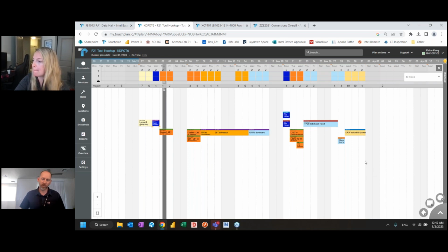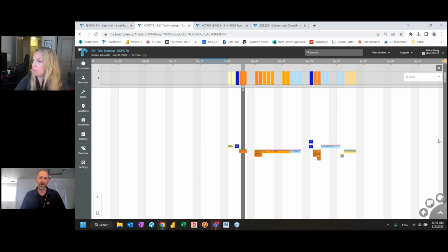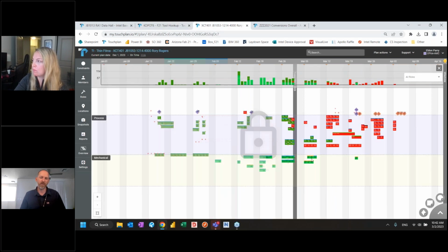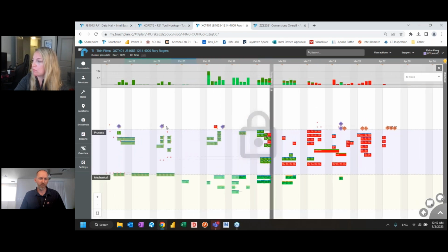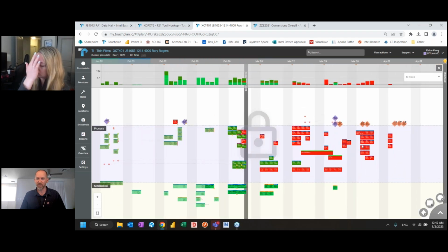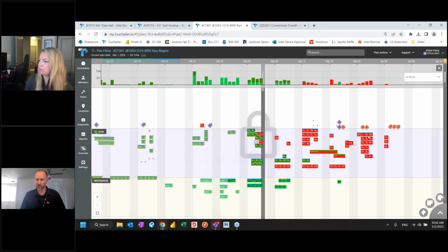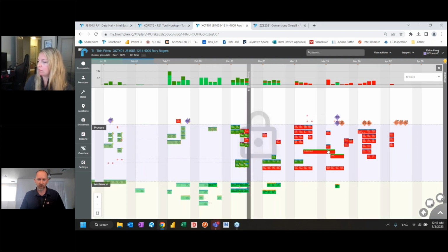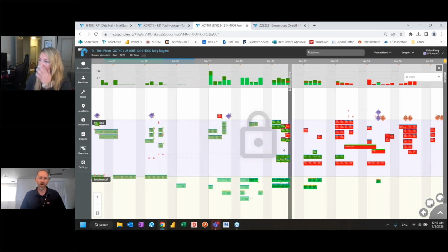We do go into a standard pole plan, right? If our general contractors have pole plans, we take this in there, and we'll often engage in a pole plan and move our items around, but we more look in a holistic start to finish view and try to see how it starts sitting in there. You can see these are milestones up top from our pole plan, these purple and orange tags. And all these tickets have to be done before certain milestones, like most construction jobs. And so in a pole plan, we help move things around and then talk through what it's going to take for us to do that.